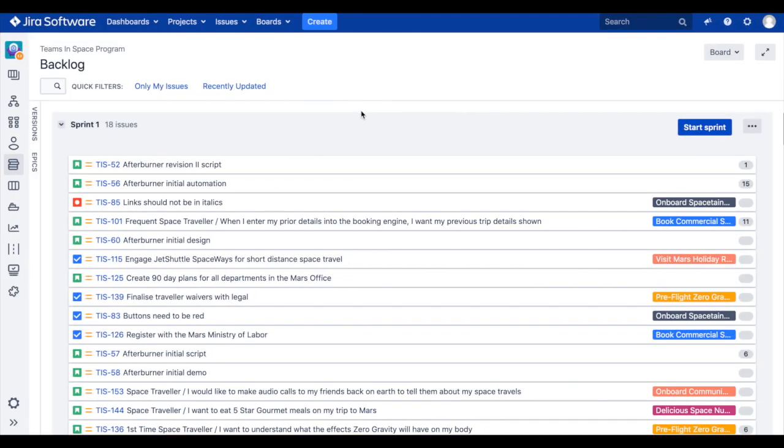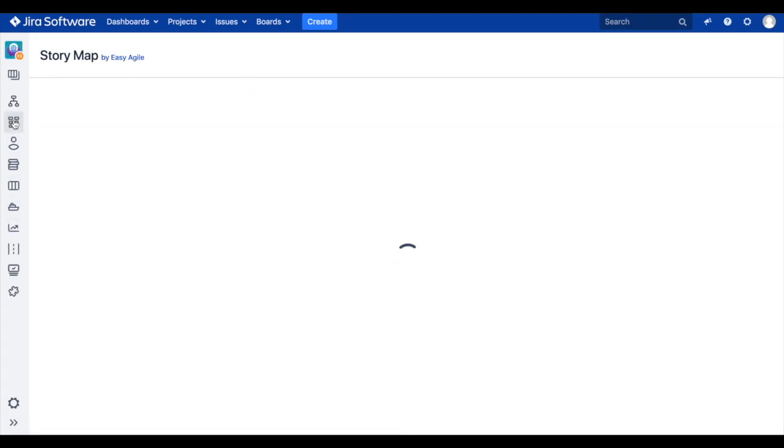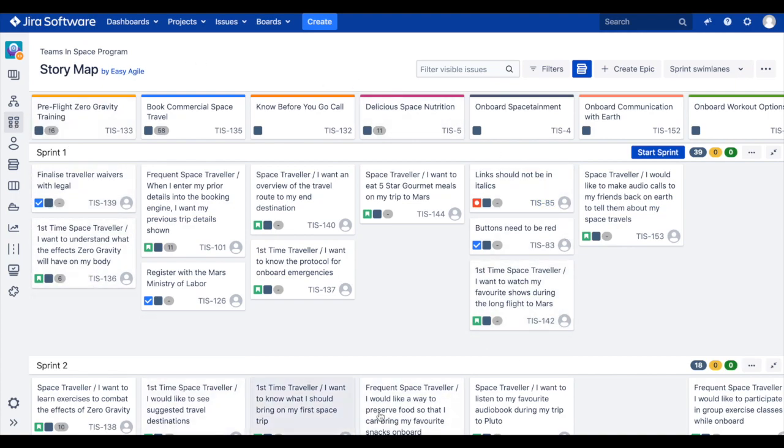Once installed, Easy Agile User Story Maps can be found in the project sidebar for every Scrum and Kanban Agile board. Clicking on the story map icon in the project sidebar will load your user story map for your selected board. If your Agile board has already been populated with issues, epics, sprints, or versions, you'll notice that on first load, the story map is pre-populated with that same data.